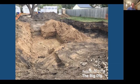So, like Joe said, when they filled it, we can't blame the homeowners, more the city. When they refilled it, they didn't compact the soil so it could be built on. So we pretty much had to dig out. We weren't directly over the footprint of the old house, but this corner was where it overlapped, and that's where we were digging down 8 feet.